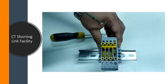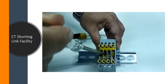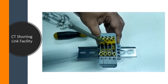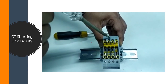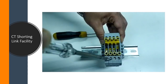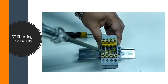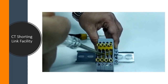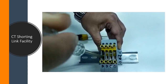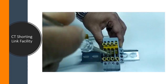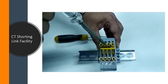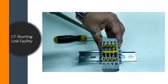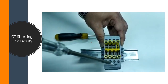If we remove these three sliders, then these three terminals are now open from the relay side — the relay is isolated from the CT and the neutral provides a return path from the CT side. That is how this slider acts as a shorting link on the CT side. Secondary injection can be performed from the relay side, and once done, the sliders can be put back in position first, and then before charging the unit we have to remove the shorting slider so all three phases and neutral are open and CT is connected to the relay.